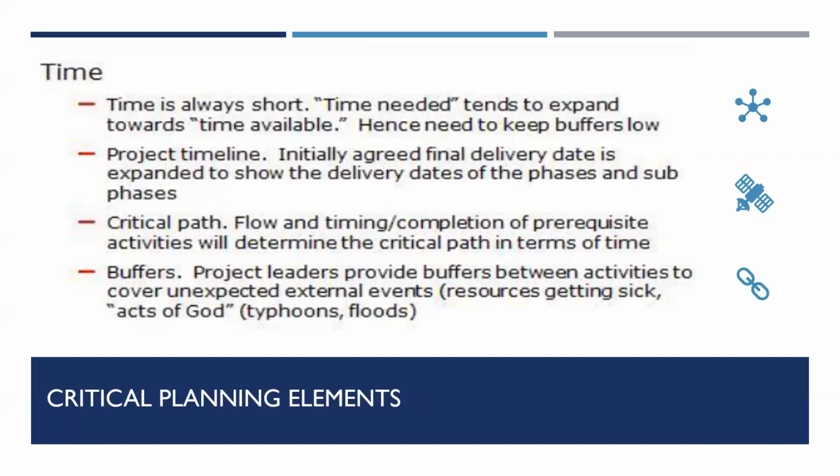changes. So buffer, when planning, a project manager often adds additional time, diba? Additional time to each task or each deliverable in case of unexpected circumstances. Then critical path, they also describe this as the sequence of project tasks which add up to the longest overall duration. This determines the shortest time possible to complete the project. Any delay of an activity on the critical path impacts the planned project completion date.